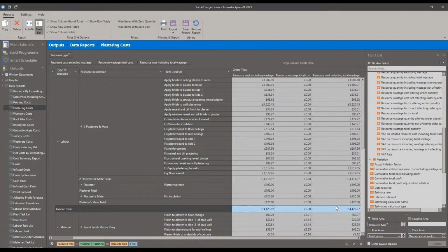Then you can go, okay, right, I'll make an agreement with them. Haggle them down to the 14.5. Use a bit of your overhead or other costs in there, like the slush money that you get from your wastage costs, to see if you can cover it from the materials wastage. See if you can take it up to, say, agree at 15 grand, or you go, okay, right, I might need to re-estimate this. My labor rates might be a bit low.